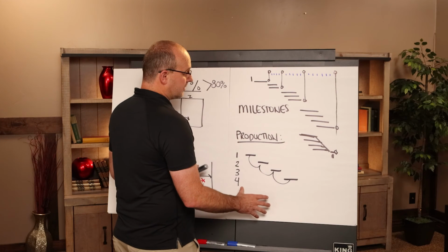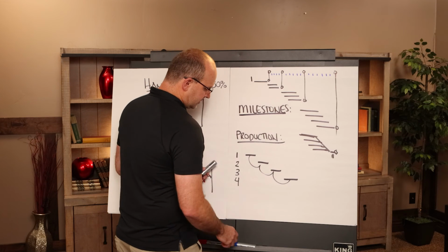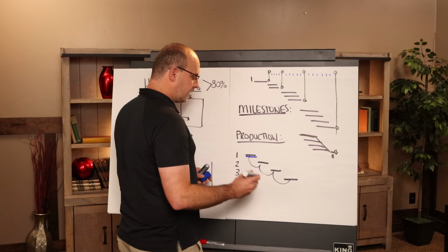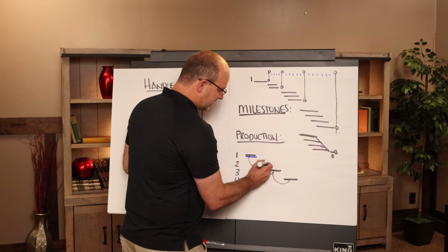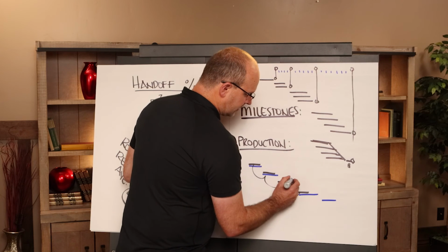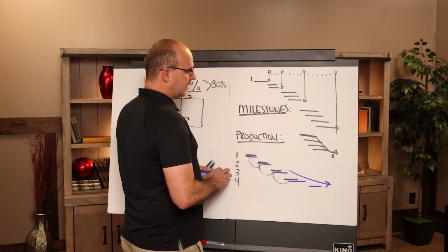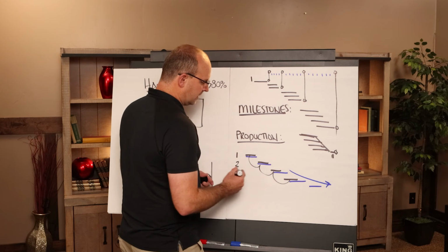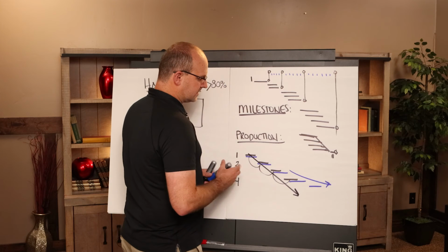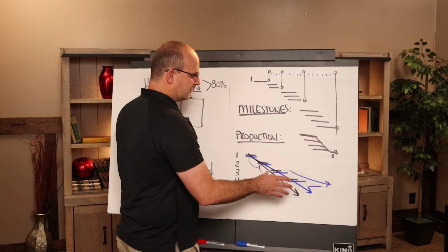You can always monitor in your schedule your production in addition to those milestones by understanding if there's any overrun. So when you as-built this first activity, okay, it took a little bit longer. Okay, not a big deal, that could trend down. But if then the second activity was like this, then you know that the third activity is going to be out, and it's just going to start cascading in a bad direction. And so tracking your progress really doesn't happen just with one-off activities. It mainly happens with repetitive activities and comparing the line of balance that was designed in the production system with the actual and tracking the progress on that level of detail.